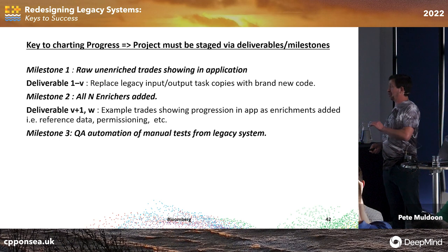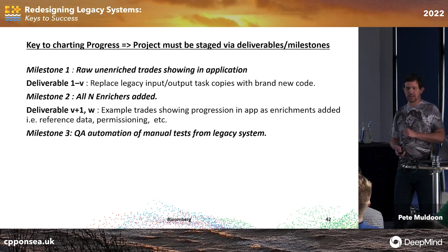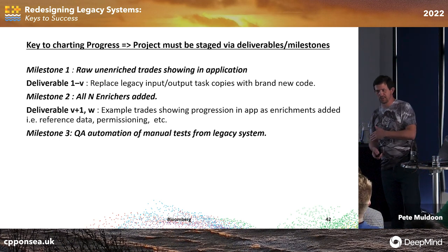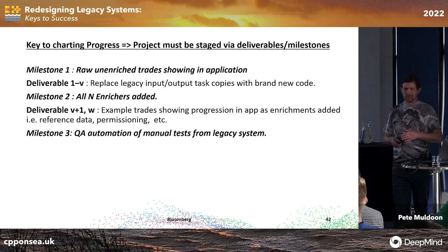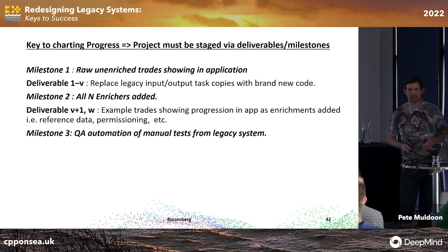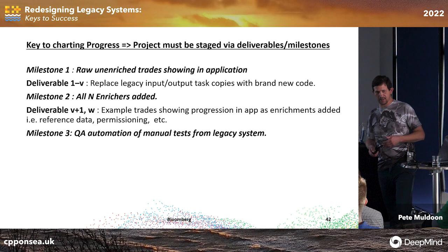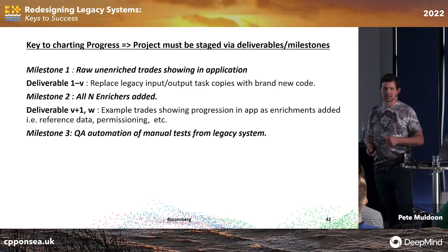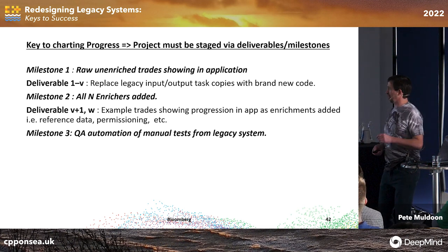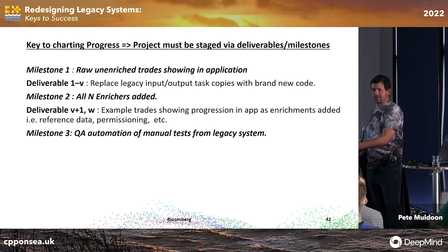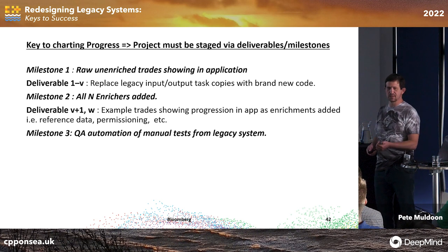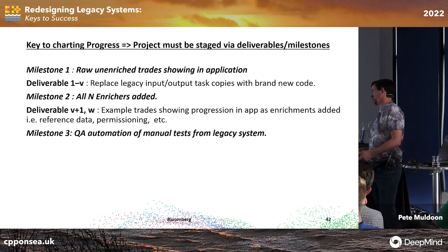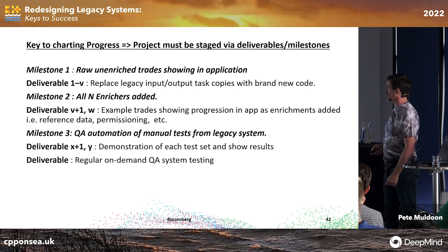But what we did plan for is to go to QA, find out all the tests they were doing, which was kind of a jumbled list. We sort of took out all the duplicates and we automated the whole thing. So instead of waiting a week for QA testing, QA testing ran in about 5 minutes. Right? Which means anytime I put a new release out, it had to pass QA first. I could run QA in dev, I could run it in beta. And even if they would have let me, I could have run it in production.